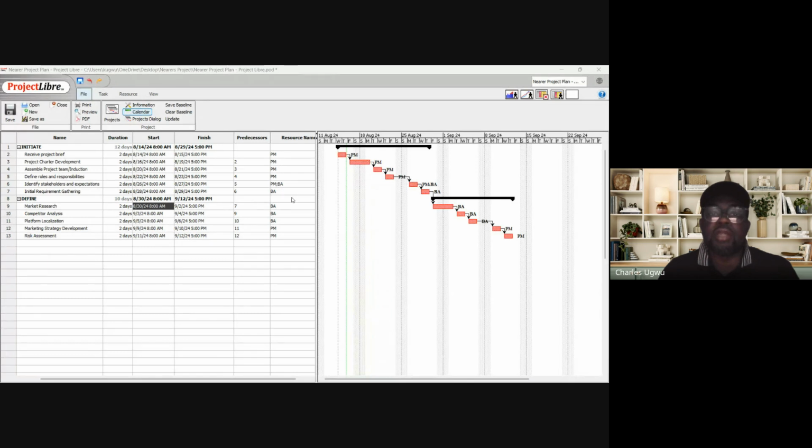I'll click on it, and you see it's going to come off this ash color and become white like the others, and equally highlighted in red because they are special days. And if I want to work like now from 8 o'clock to 12 o'clock, you have to specify the time because it's not a standard working day. It's left for you to specify the time you want to work on these days.